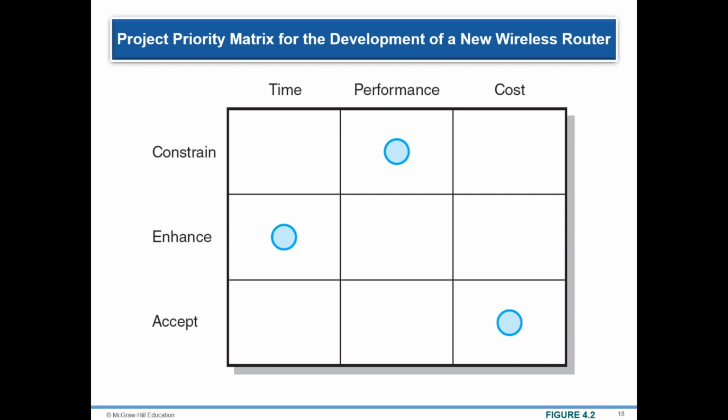Priorities vary from project to project. For example, for many software projects, time to market is critical, and companies like Microsoft may defer original scope requirements to later versions in order to get to the market. Alternatively, for a special event, time is constrained once the date has been announced, and if the budget is right, the project manager will compromise the scope of the project in order to complete the project on time.